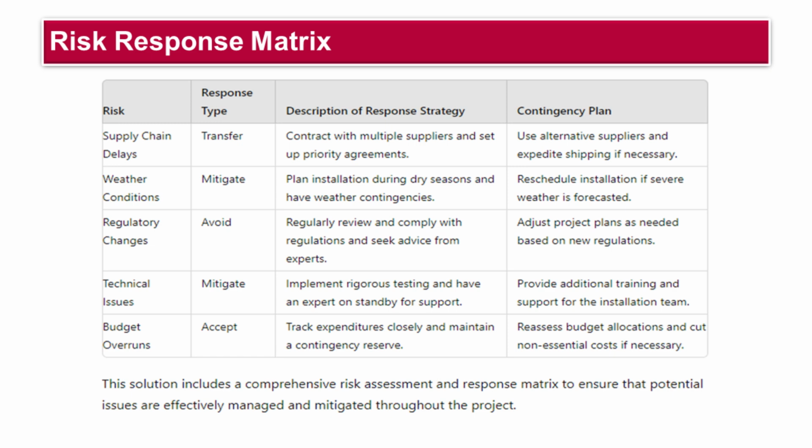Contingency plan. This is a backup plan detailing the actions to be taken if the risk materializes despite the response strategy. The contingency plan ensures that the project team is prepared to manage the impact of the risk and minimize disruptions. It often includes specific steps to follow when the risk event occurs, allocation of resources and responsibilities for managing the risk impact, and communication plans to inform stakeholders about the risk event and the actions being taken.